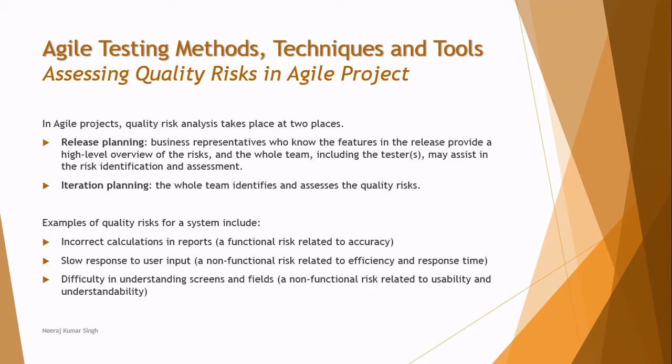In agile methodology, quality risk analysis takes place at two stages: release planning and iteration planning. Release planning covers the overall process — when we start overall planning, the whole team contributes to determine certain risk areas. Iteration planning is where the whole team again identifies and assesses quality risks. In summary, release planning focuses more on project risk, while iteration planning considers quality risk.